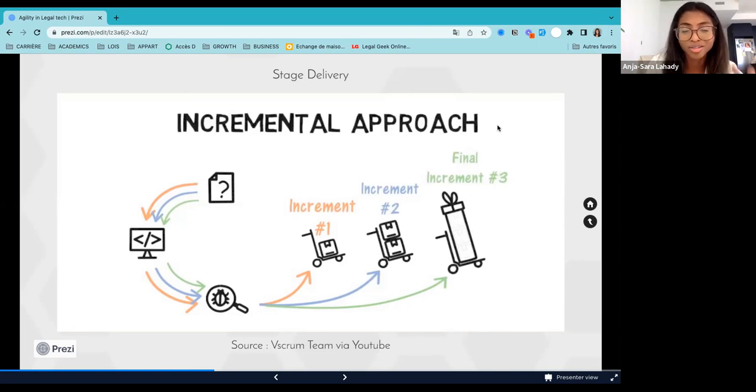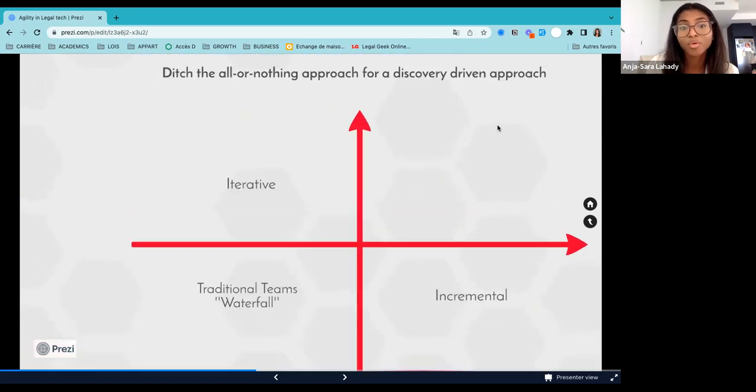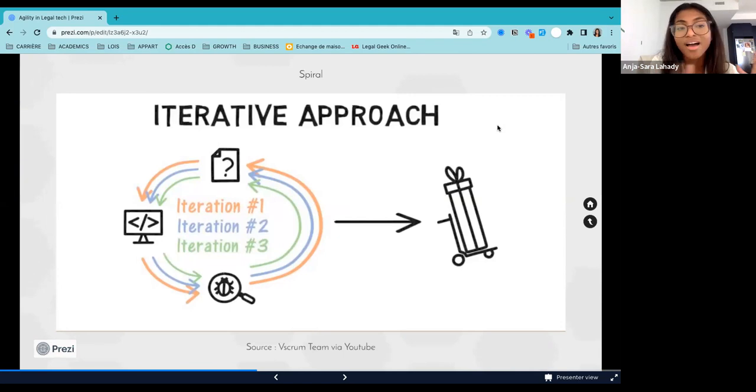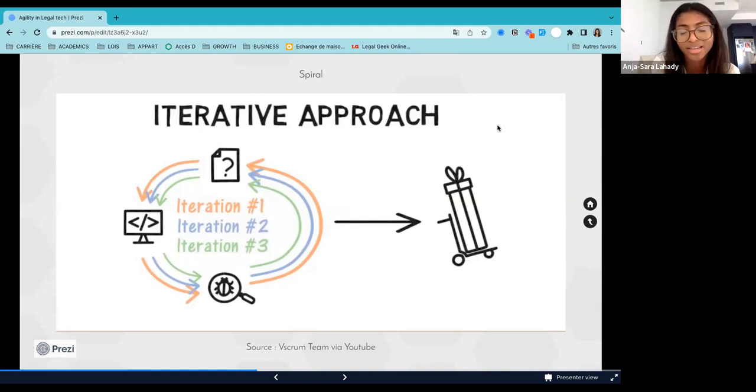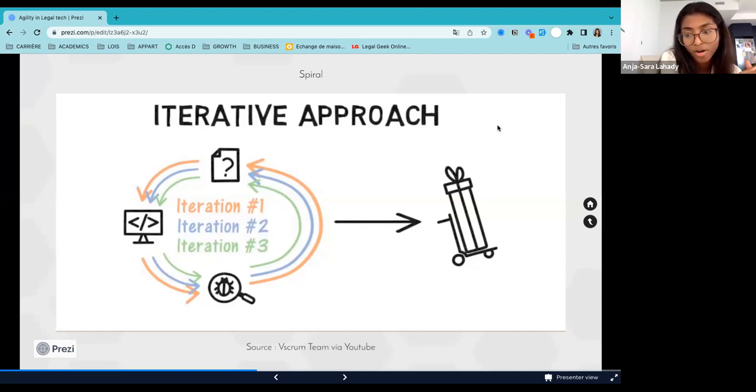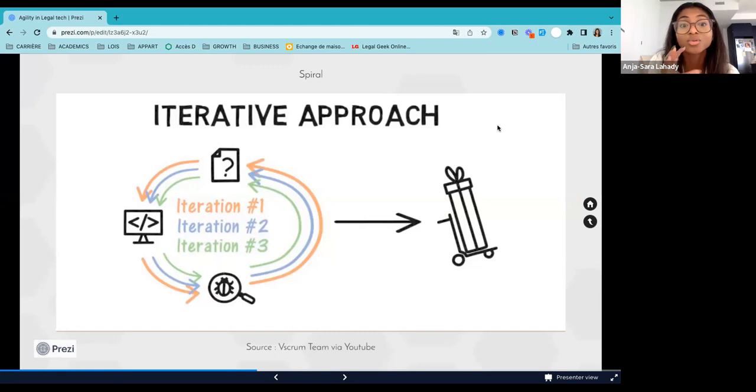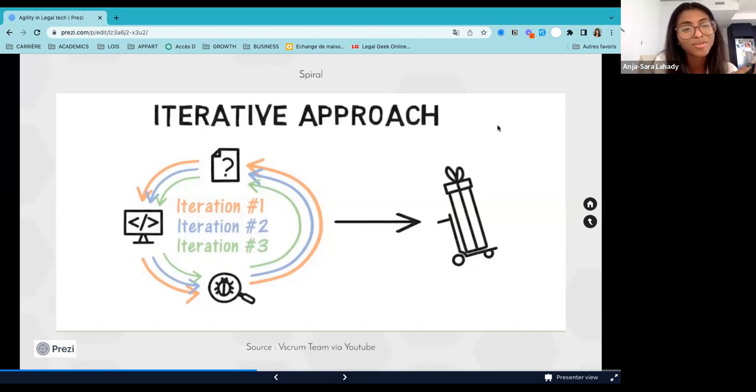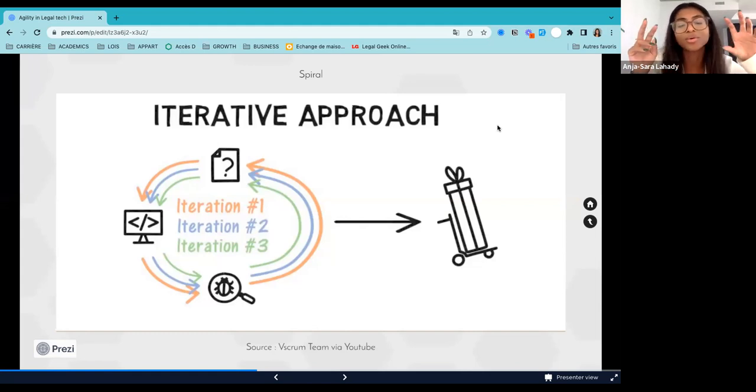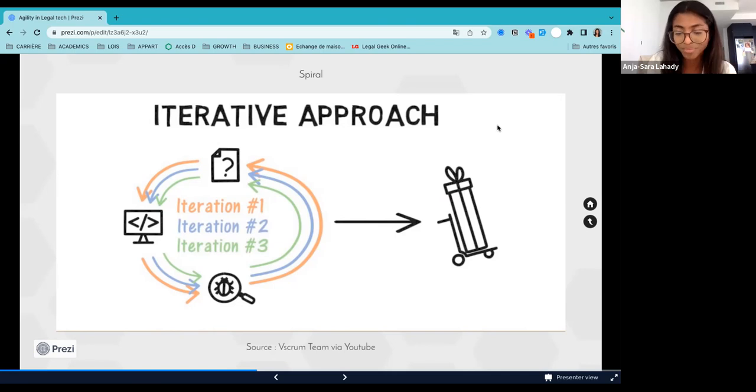Now, let's look at an iterative delivery, which is a bit different, it would be more of a spiral approach. So just for this analogy, for me to make it simple, let's say I'm writing a book, and I'm writing a book with an incremental approach, I would write that book, and I would deliver chapter one and two to my editor, and then chapter three and four to my editor, and then chapter five and six, and then my bio to my editor. If I would use an iterative approach, if I were to write that book, I would write a first rough draft of that book. So I would write chapter one to six, and then I would go back to chapter one and revisit the whole chapter one to six and correct and refine along the way. So it's more of a spiral approach. And now let's go back to our portal. So that would mean that we would deliver that portal to our team. Then we would test it, we refine it along the way. So we would test all of the, we would deliver a portal with all of the features that has been, that have been discussed, but then we would refine along the way all of the features that are in that portal. So that is the iterative approach.